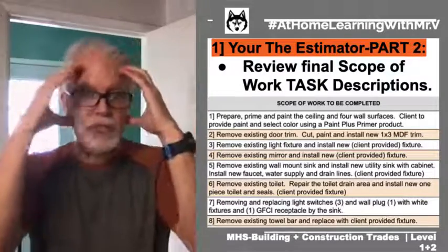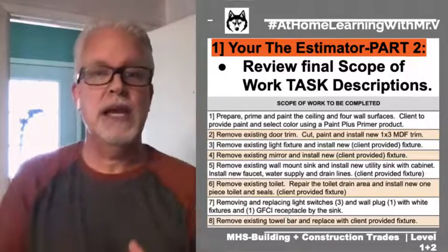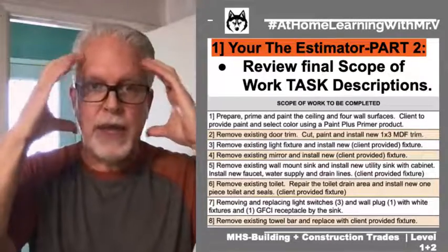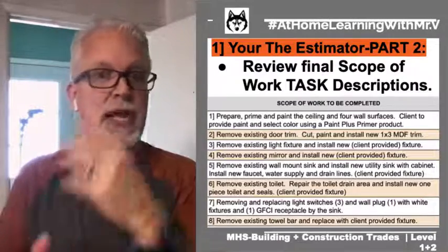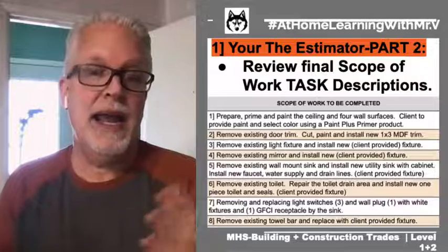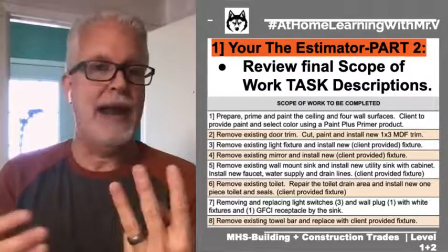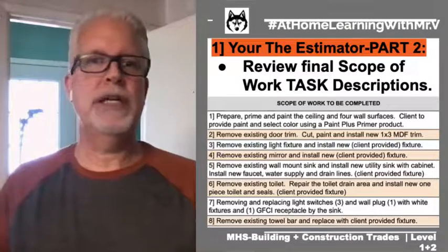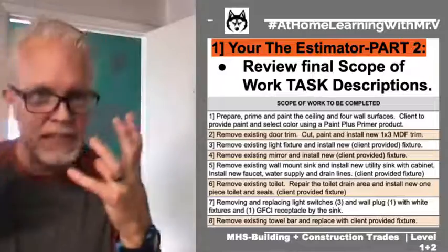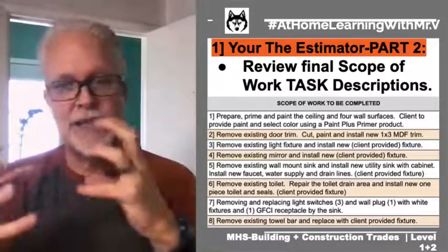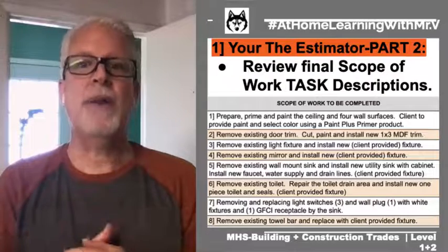So that's what I want you guys to start thinking about as you're reading through these descriptions: trying to do the critical thinking, break it down into the different things we have to do, and then add an amount of time to each one of those parts, add them up, and there's your estimate, you're good to go. All right, so that's what estimators do all day long, keeping track of the details, making sure everything is included in these descriptions. That's part of what we're doing.